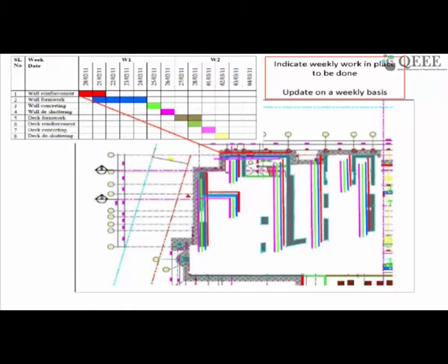So CCPM makes an assumption that people will only give, and I think all of us can relate to that, that work will only get done in time to meet the deadline. So unless you manage the project based on these deadlines and give buffers to these deadlines, you will not be able to get your project in on time. So this is the basic concept. It then puts it into more of a mathematical formulation to be able to plan and monitor. There might be more elaboration. Again, please refer, there's a lot of information on CCPM.